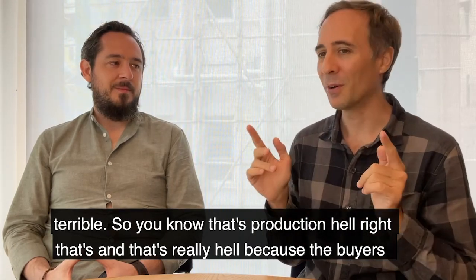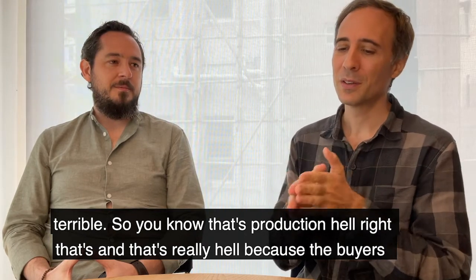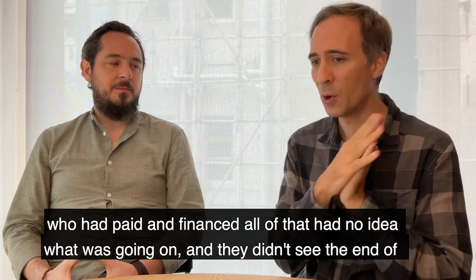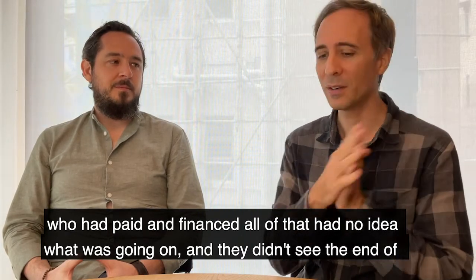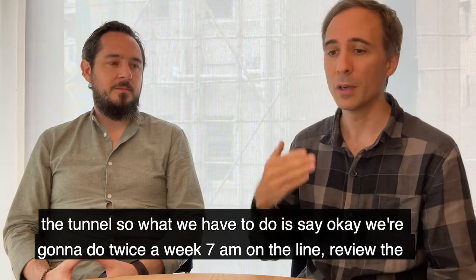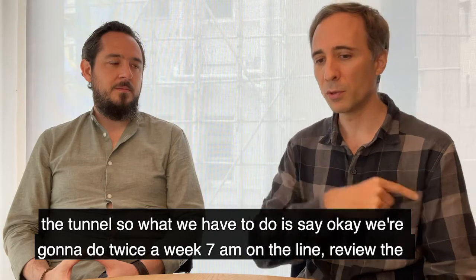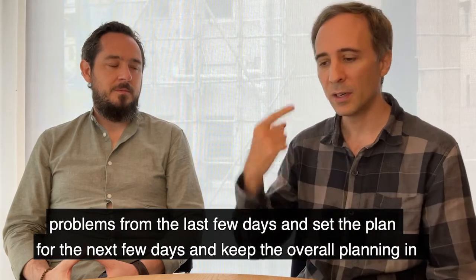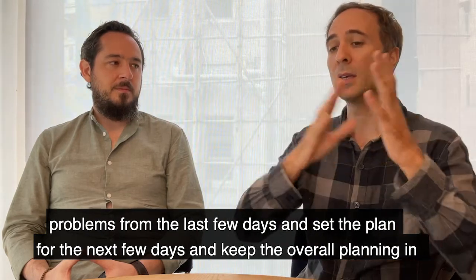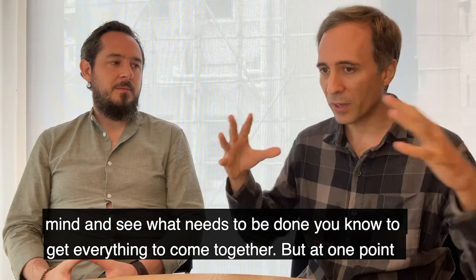So that's production hell, right? That's really hell, because the buyers who had paid and financed all of that had no idea what was going on, and they didn't see the end of the tunnel. So what we had to do is say, okay, we're going to do twice a week, 7 a.m. on the line, review the problems from the last few days, and set the plan for the next few days, and keep the overall plan in mind, and see what needs to be done to get everything to come together.